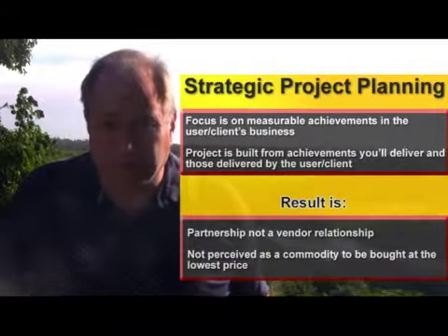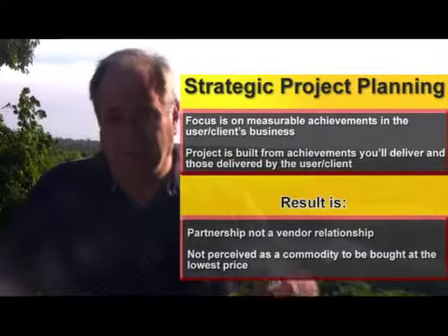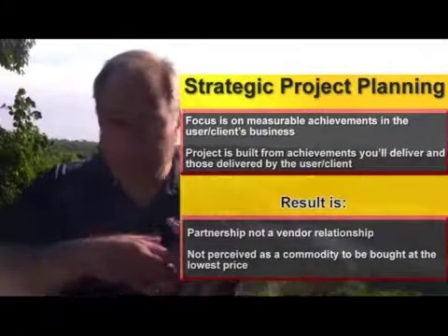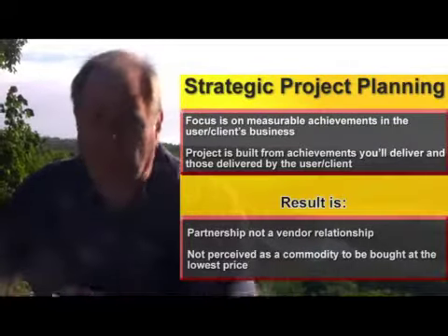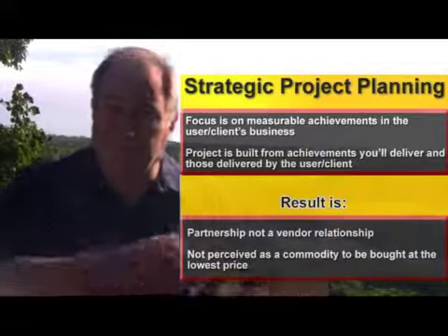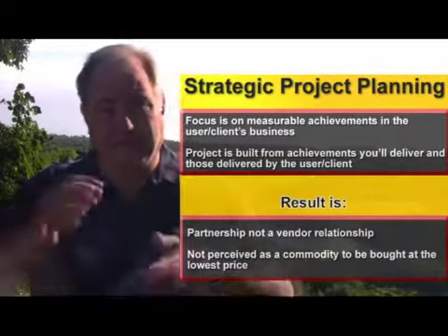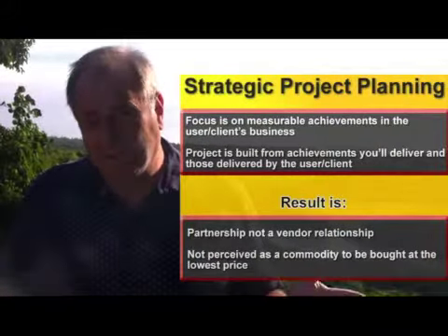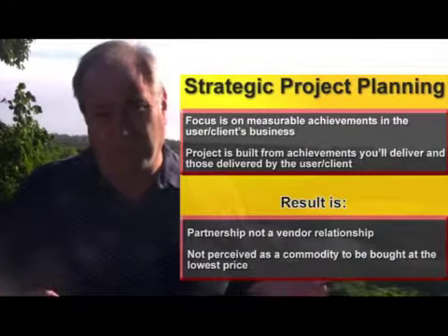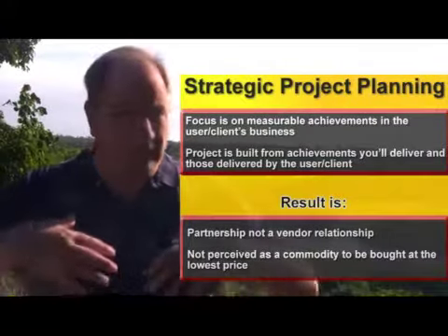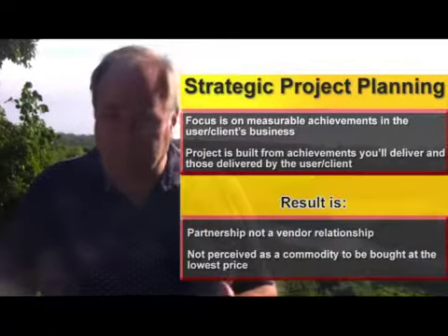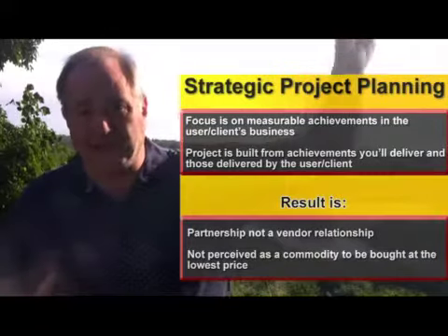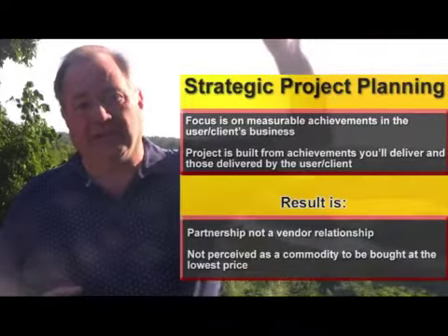If I'm doing tactical planning and all I know is that the operations VP wants a new manufacturing building, we're going to build the building or build the software or build the procedures and changes and think we're finished, and we've done nothing to relieve that executive's performance pressure. So that's why at the program manager and portfolio level, you are not doing tactical planning. You are doing strategic planning about business outcomes in the user or decision maker's division.